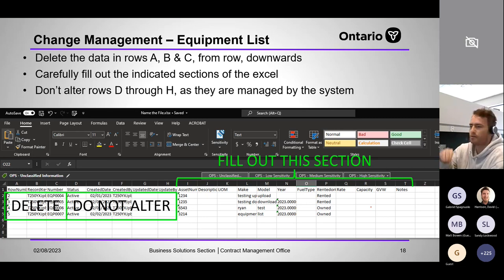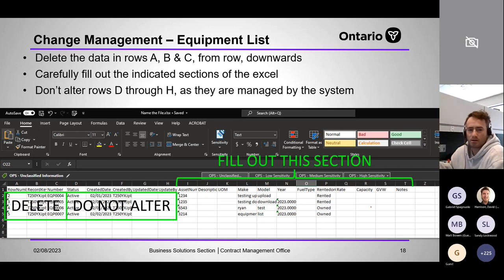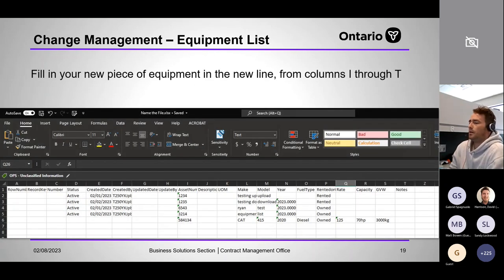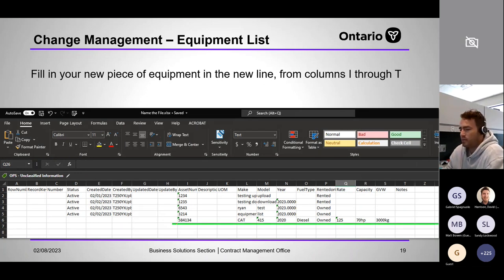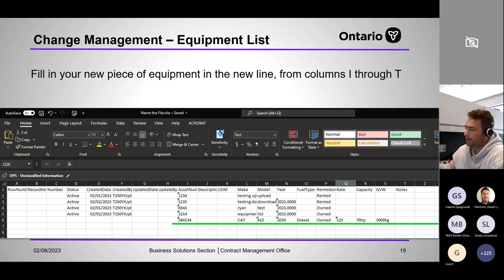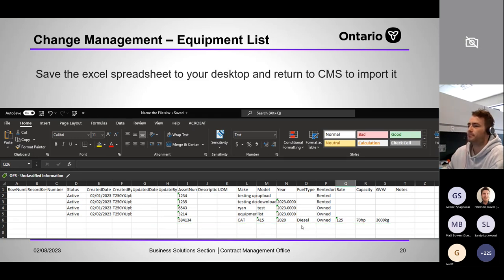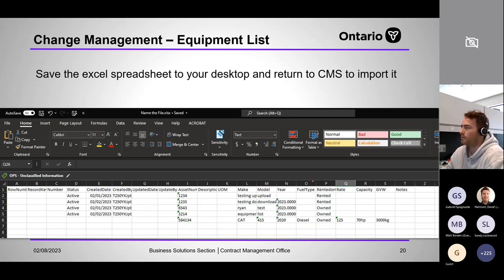The material list has changed from WB CMS. Previously you had to put a material in the list in order to reference it in the daily work record, which wasn't necessarily appropriate. The materials list in CMS now strictly serves DSM items — any DSM items you have go in there, creating a record. For materials on a DWR, you just type the material in directly — a box of nails, a tube of epoxy — you don't have to pre-create it elsewhere.